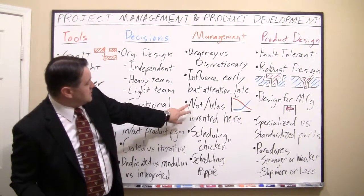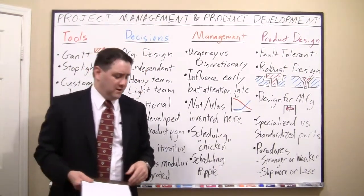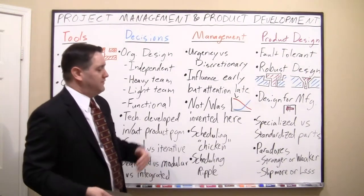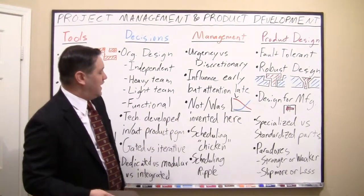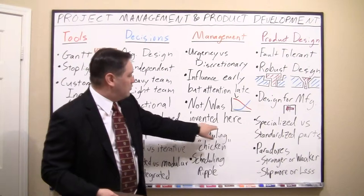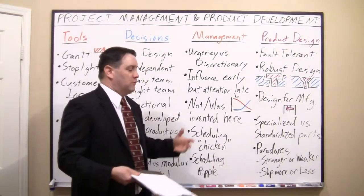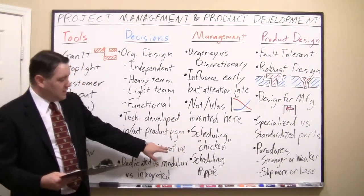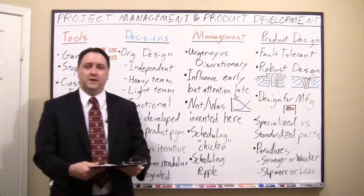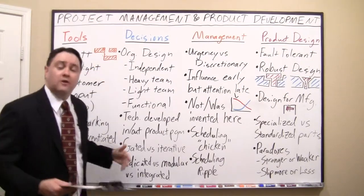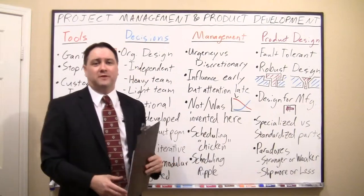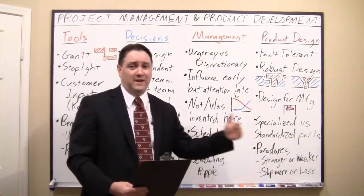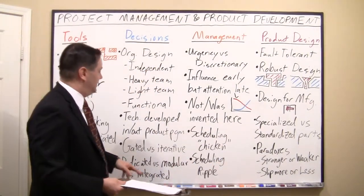Another management issue is 'not invented here' — where people avoid technologies they didn't develop themselves, biased toward believing their own solutions are best. The flip side is 'was invented here' — continuing to use an internal solution even after it's been leapfrogged by competitors. There's also what I call a scheduling game of chicken: nobody wants to be the first to admit they'll be late, because whoever admits it gets blamed for the delay, even if everyone else is also behind.